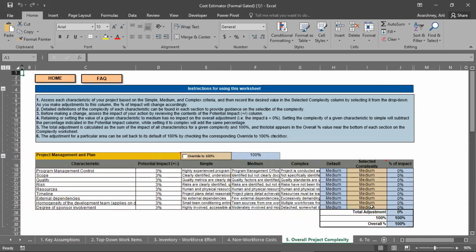the consolidation, the complexity of the project itself. So here we're going to talk about the non-direct costs. Okay, we calculated the direct cost, the labor cost. We calculated the direct material cost. Let us say the word material cost or non-workforce cost. The third one, we are going to calculate the overheads on the project, which are nothing but the project manager cost, your scheduler's cost, controller cost, or the testing team's cost, review team's cost, all those things you are going to calculate now by phase, right?